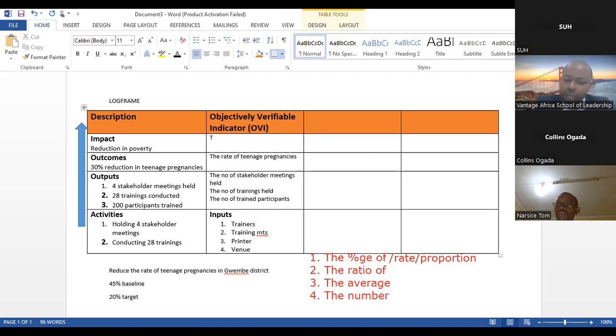So you can have something. It can be a percentage, okay? Because we said the percentage can be used at either outcome and impact level. So you could say the percentage of the population living below poverty line. It's as simple as that. So that can be a measure at the impact level. It can be an impact level indicator, right? Now, these are the two very important columns that you need to understand within a log frame. The other two...